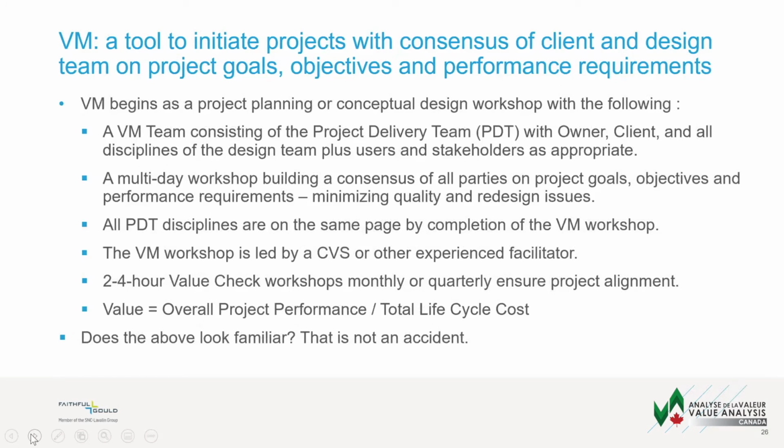So we want to use value management as a tool to initiate projects with consensus of client and design team on the project goals, objectives, and performance requirements. So in that model, VM would begin as a project planning or conceptual design workshop with the following. The VM team would consist of the project delivery team with owner, client, and all disciplines of the design team, plus users and stakeholders as appropriate. A multi-day workshop building a consensus of all parties on the project goals, objectives, and performance requirements, minimizing quality and redesign issues. All project delivery team disciplines are on the same page by completion of the VM workshop.